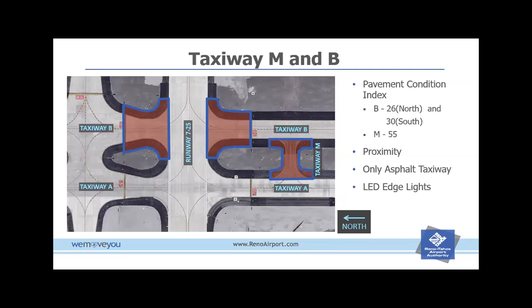Taxiway Mike is a little bit different. It has a PCI of 55, so it hasn't reached that threshold. But we think it's warranted to do this project along with Taxiway Bravo because of the proximity. We will only have to shut down the taxiways and runways once instead of having to come back and redo that one later. And this Taxiway Mike is our only asphalt taxiway left on the airport.